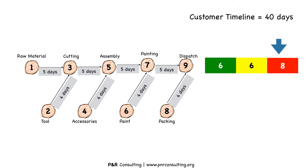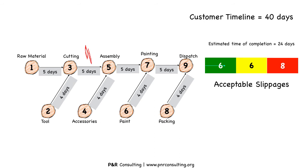What information would we be able to get out of buffer monitoring? When the penetration of a project is in green, as shown here, it indicates a normal situation and most variables are under control. Notice that the estimated time of completion is 24 days but the original estimation was 20 days. Still fine, because the customer's required timeline is 40 days, and finishing in 24 days is good enough. These slippages are normal and acceptable.